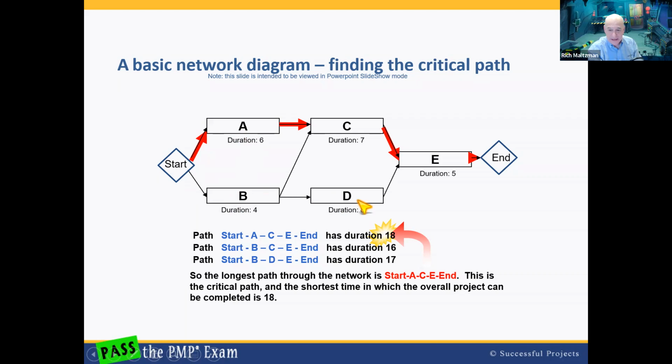One of the things that you should remember about the critical path is that in a real project, it's dynamic. The critical path could change. Certainly, it's going to be a more complicated network diagram. Certainly, there's going to be more risks and contractors and subcontractors not performing. So that critical path will shift, perhaps daily, depending on the type of project you're working.